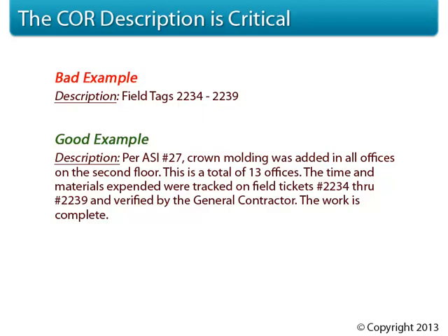Now, I'm not going to reiterate anything from the last 2 slides, but notice the statement, "This work is complete." Without this statement, the owner will wonder if this is the total cost or if another change order request for later field tags is coming.